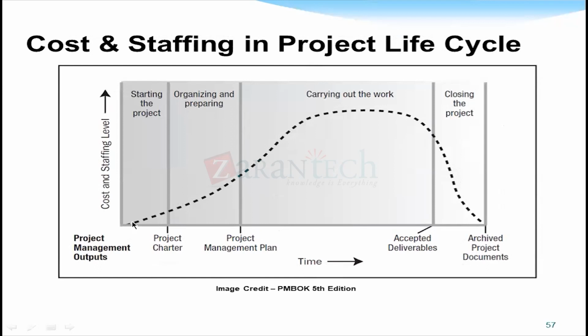Project management work starts at the initiation of the project, where it will be a little slow. As you go on, the work is maximum during the middle, like carrying out the work, monitoring, execution, all that will have more. At the closing, again, it will be decreasing. Therefore, the cost of the project at the start will be low. As time increases, cost increases. At the closing of the project, it will be low.